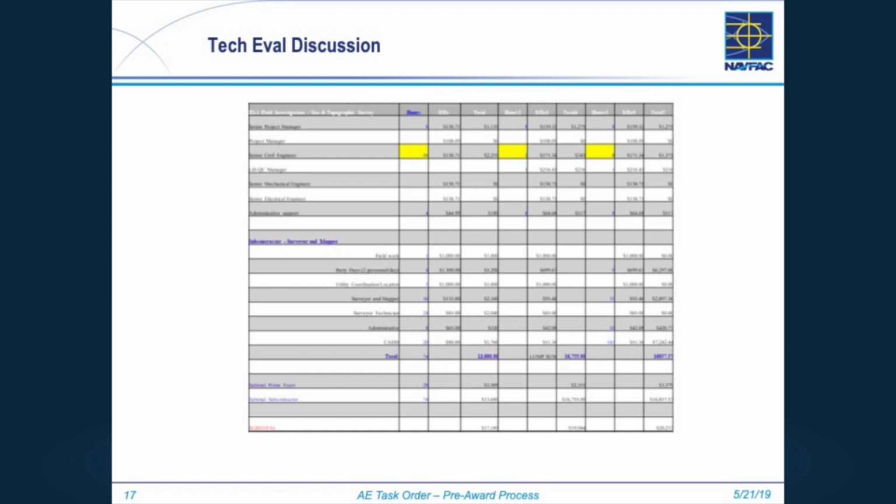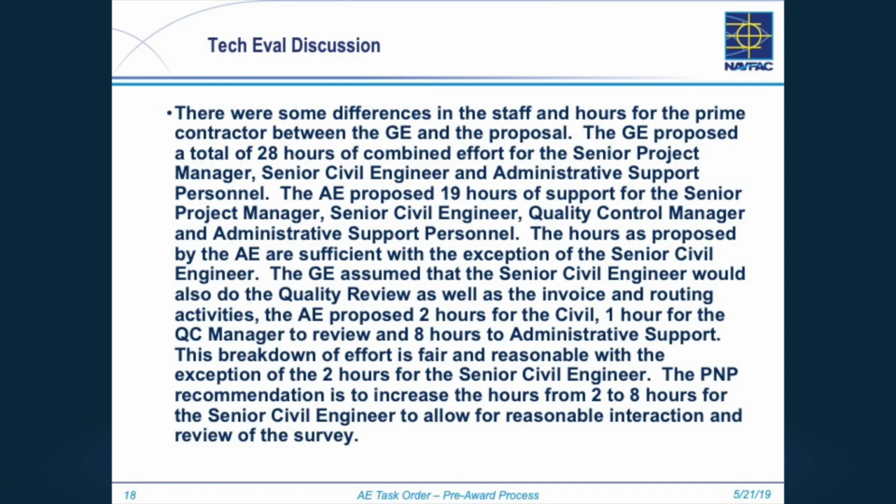And the write-up that went along with that, so you can say, hey, I don't think they got enough. So in this particular one, we said, you know what? The way you've got it spread out, there's no way that's enough to do the quality review and all of the things we're asking you to do. We think you're going to need more hours than that. May not be 16, but 8. So that would be a discussion point.